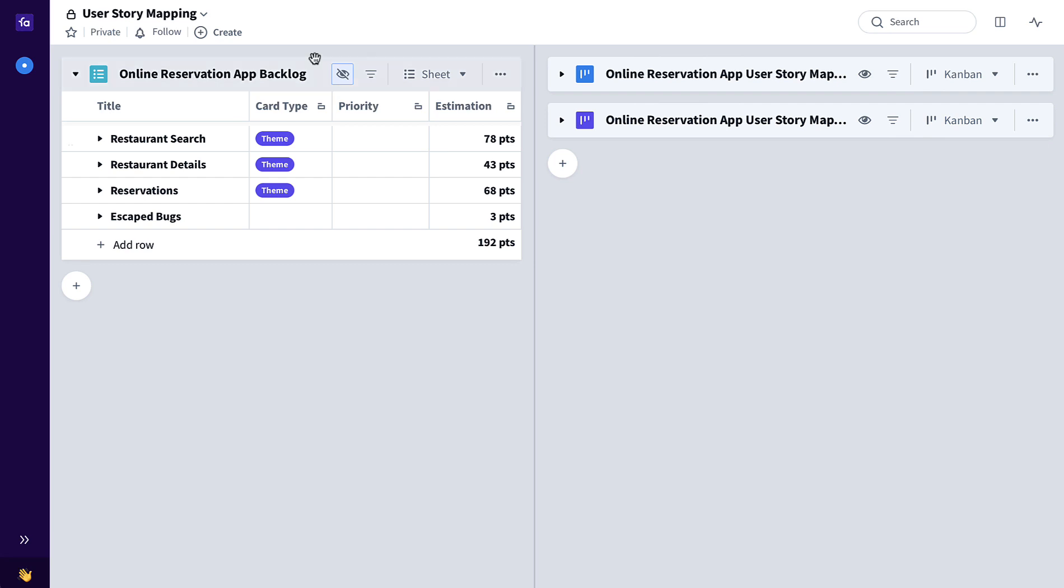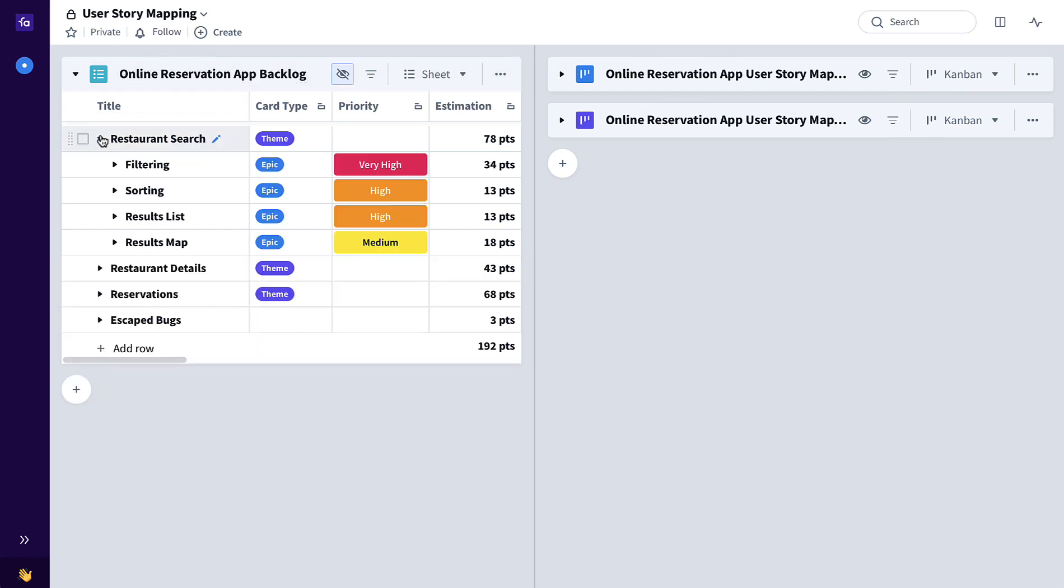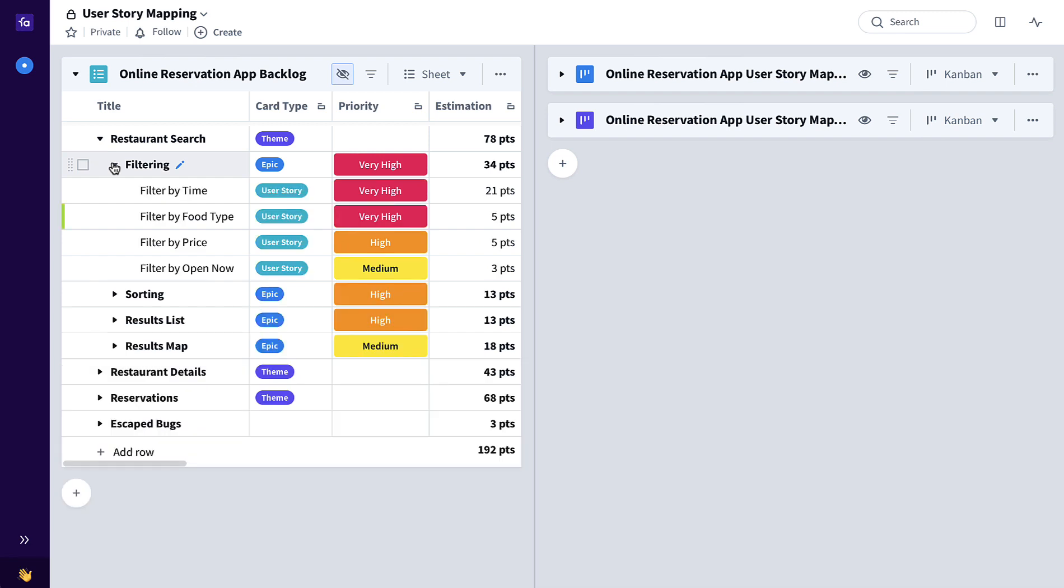Any product begins with this prioritized list, otherwise known as a backlog of themes broken down into epics broken down into user stories or features.